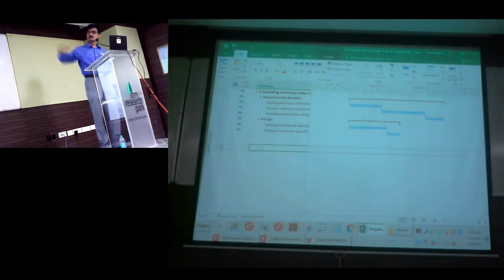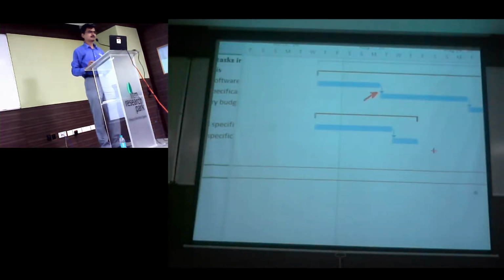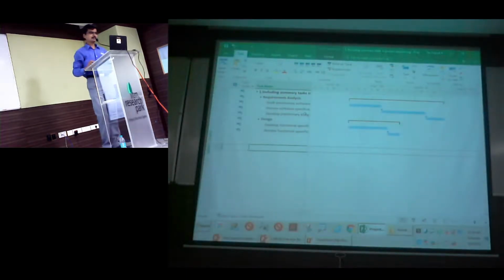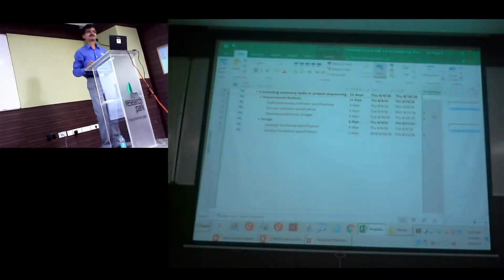My general approach is when the requirement analysis is done, my first activity can automatically start. But these are default things, right? These are not default. When you say default things, I hope you're talking about As Soon As Possible. This is a finish to start dependency that has been placed here, which means only when the first task finishes, the second task can actually start. So please do challenge me if you need more requirements. Yes, sir. Predecessor is getting updated. So when you start linking it, you will notice your predecessor column will also be updated. And the constraint type is as soon as possible. Correct. Because we are going for a forward scheduling here. Good. Okay, now let's move on.